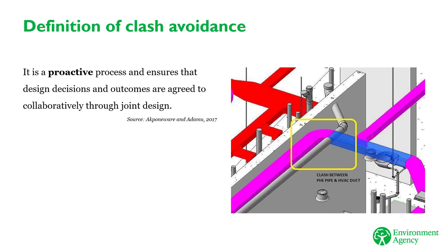Clash avoidance is a proactive process which ensures that the design decisions within the design models are clash-free. So think of clash avoidance as an individual designer's quality assurance to avoid clashes during design, or planned proactive coordination processes between disciplines, such as may be defined within a volume strategy. Other benefits of clash avoidance are: you can avoid clashes in models from the same discipline by applying internal coordination processes. Clashes between disciplines can be avoided through design strategies and early use of federated models when initiating design.